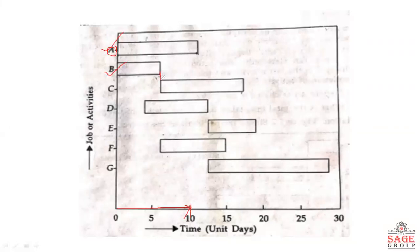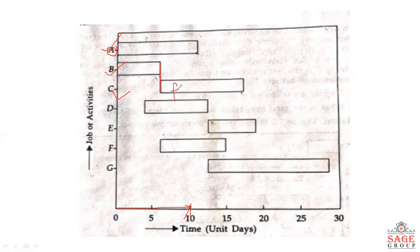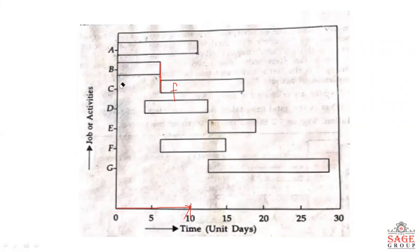After B work is completed, we have to complete C work. For example, if you have to construct a building on a site, first we do site preparation as activity A, then excavation as activity B. After the excavation is done, we can start the foundation work as activity C.